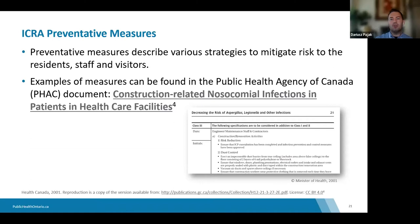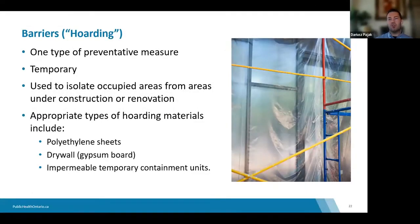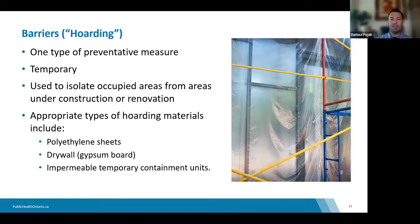One key idea behind protecting people during CRMD projects is to isolate the work from those occupying the space. Barriers or hoarding — also called containment — refers to temporarily separating the construction work area from other occupants. Types of hoarding materials include polyethylene thick plastic sheeting, drywall, and fire-retardant poly, which is especially important if the hoarding is left exposed.